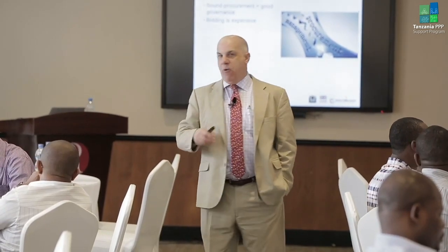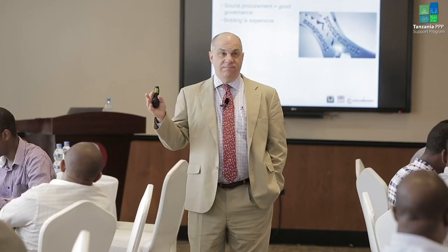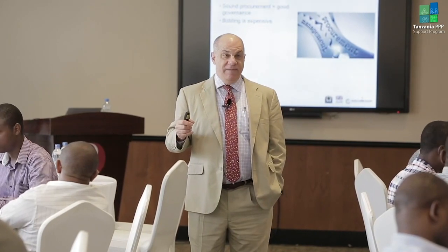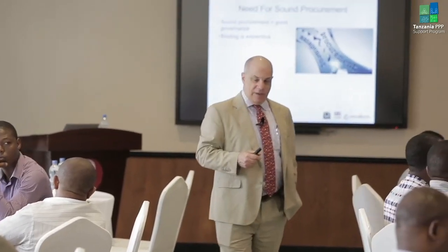Just take a wild guess how much you think they might have to spend of their own money with no guarantee that they're going to win. So let's say it's 50 billion shillings. It could be 1% of that, and what would that be, 500 million shillings? It's very expensive to put these together, because let's say for that bus terminal, they're going to have